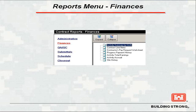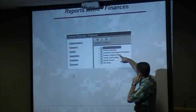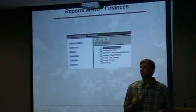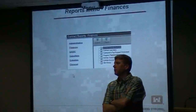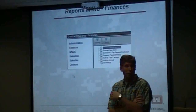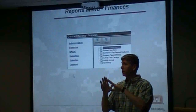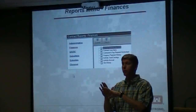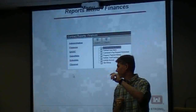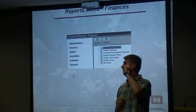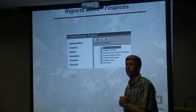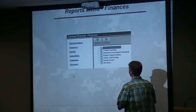Under finances, there's an activities summary by plan. The contractor's pay request worksheet is one I highly recommend running every month. It goes on an activity-by-activity basis of what you're asking payment for, goes to the action items report, and marries that up with the activities you're asking dollars on. If you're having a problem, it will flag issues like missing insurance for a sub or incomplete submittals or preparatory meetings.